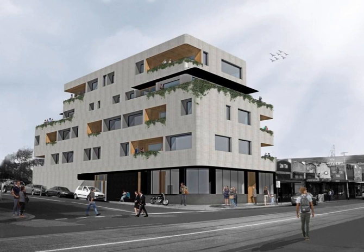Just back to some discussion earlier about foreign supply. That's probably the biggest challenge with that, because you're putting it on a ship for minimum 35 days, mostly 40 days, and to get that to land right, come through customs and arrive at site on the correct day, that's pretty hard to do. Yeah. Or at your off-site facility with rental on containers after 2 days.